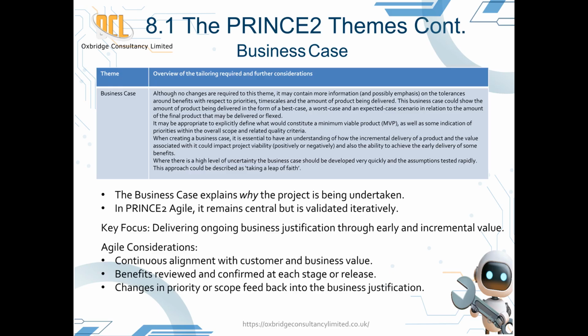Example from practice: imagine a project developing a digital customer portal. The initial business case projected £1 million in annual savings. After the first release, early analytics show 60% of that benefit realized already. The team uses this feedback to justify reprioritizing future features, focusing on areas that deliver faster ROI.